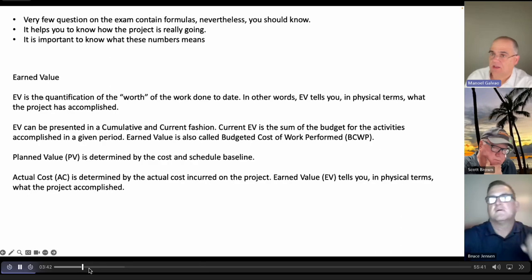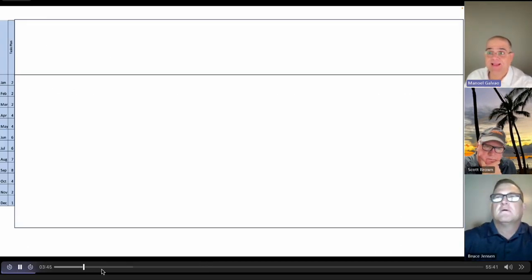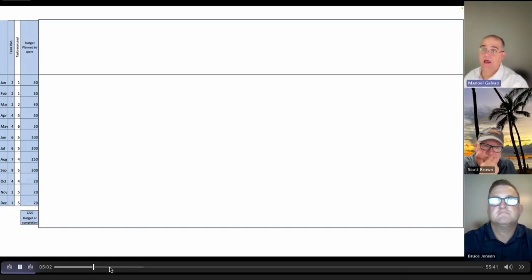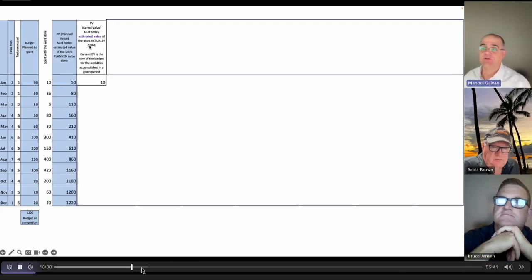Let's say that I planned to do two tasks in January, and then two tasks in February, and then two tasks in March, four different tasks in April, and so forth. Now let's talk about budget, right? To do those two tasks, I planned to spend $50. And then in February, I planned to do two different tasks, which would cost me $30, and so forth. Everything in blue was what I planned. So current EV is the sum of the budget for the activities accomplished in the given period.